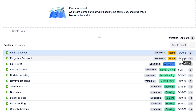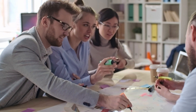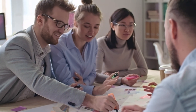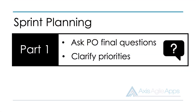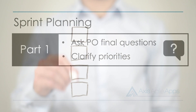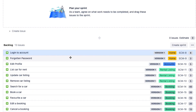The first part is where we have not just the scrum master and the delivery team, but also the product owner. The first part of sprint planning is to ask the product owner any final questions to clarify the top priorities. We just ask questions and clarify before we get into the second part. Just a point to note — this first part is really just a formality. If you've been proactively refining your product backlog, any questions that need to be answered probably have already been answered, so sometimes you can skip it and get straight into the second part.